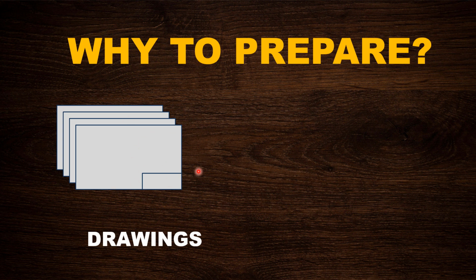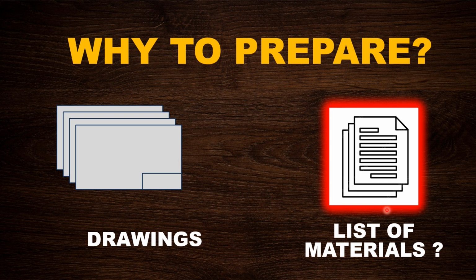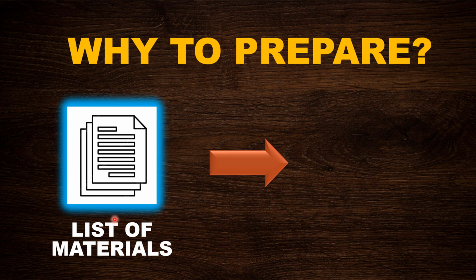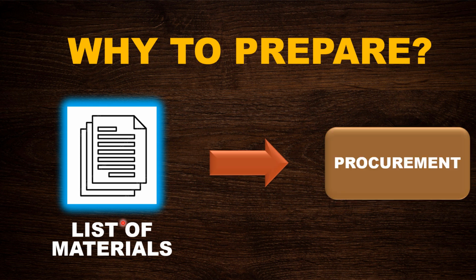Now how do you procure the material for those drawings? Without an MTO, how do you think one can go and procure? You are going to prepare a material list, right? This material list will consist of the materials included in all of these drawings. You list out all this material in one particular document, and this document goes to procurement. That is how it works.